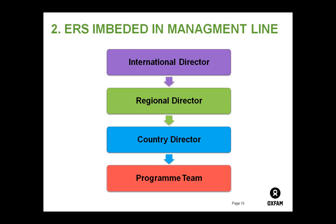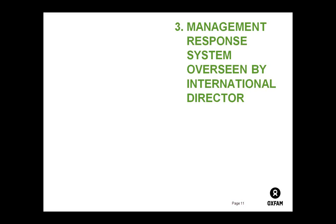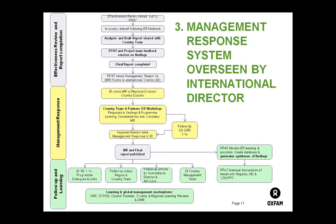Another thing we've really tried to do is leverage Oxfam's organizational structure. Oxfam is both very decentralized at country level but also very hierarchical. These effectiveness reviews are senior management initiatives — they go from international director, regional director, country director, right down to the program team — and it's been really important to have that senior management backing and support. Country teams that are subjected to these effectiveness reviews must complete a management response and send it to the international director, who oversees it.